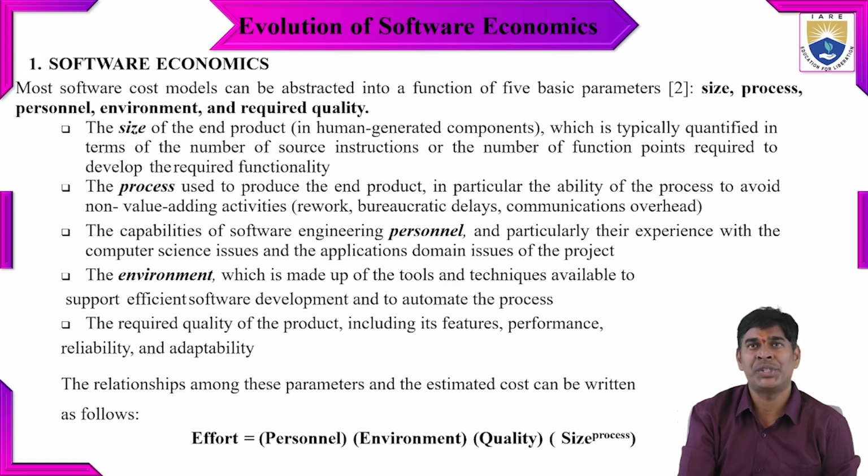So mainly we need to check what the size of the product is. So how are they going to check the size? Size is mainly based upon the number of source instructions, or lines of code, or we can call it the number of function points, which will be quantified in the software during the initial stage of developing the functionality.